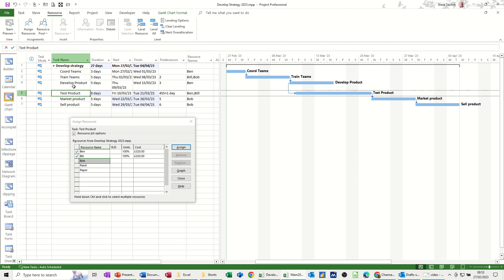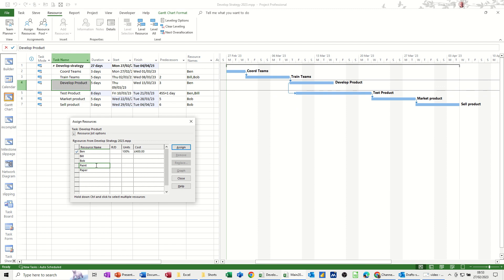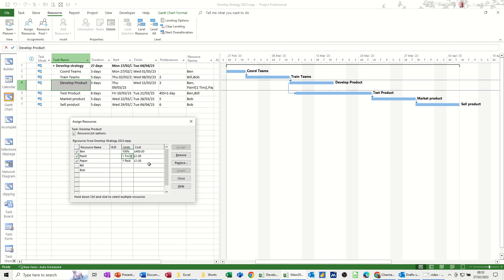But now, equipment. So on develop product, let's say that they use paint. I'm going to assign paint and then I'm going to assign paper. Now, at the moment, it's just coming in as £1. At the moment, if I leave it as that, that's just £1 for one tin. But I want this to show £1 per hour. So £1 per hour. And same with the paper. So what you have to do in the units area is you just go 1 forward slash HR, which is the duration. And then that should change to £8.